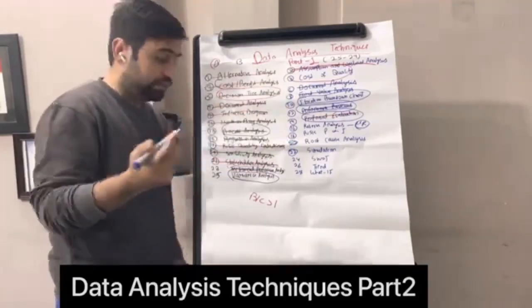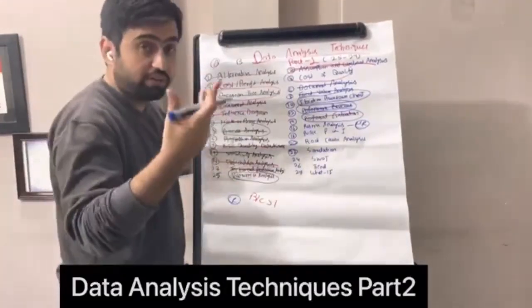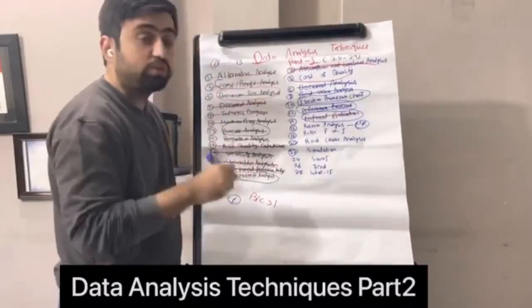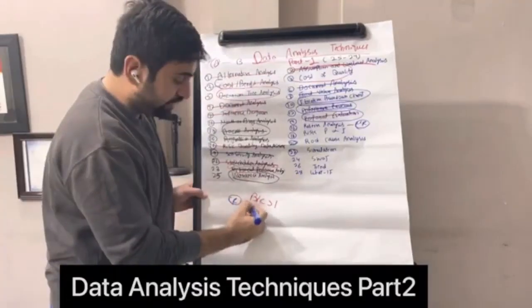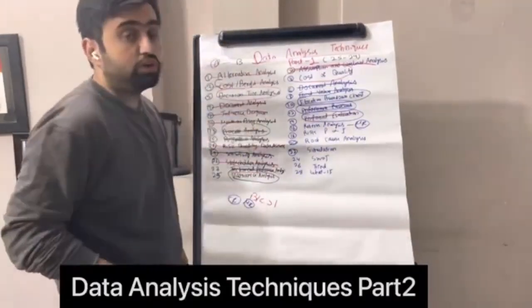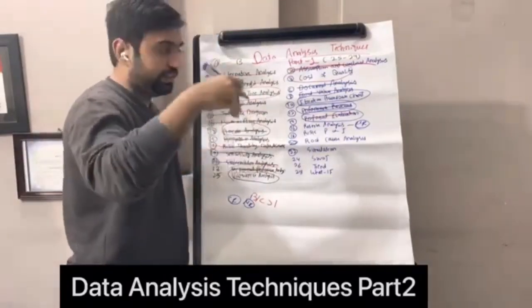We have two reserves: contingency reserves for known unknowns, the risks we have identified. Known unknown means the risk we have identified, and we put the contingency reserves in the activities. Then we have management reserves for unknown risk, and the management holds it. If we want to use it, we need to go through the change control board and get it in the system.